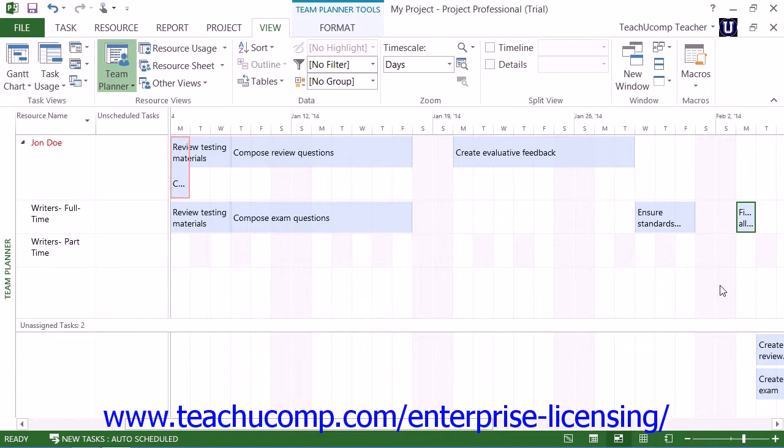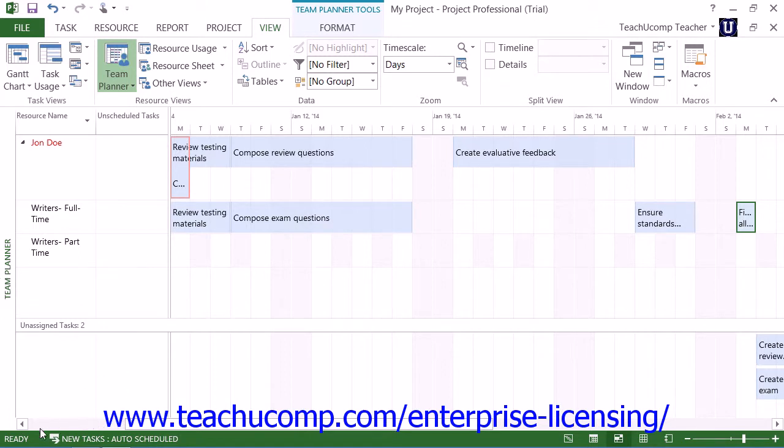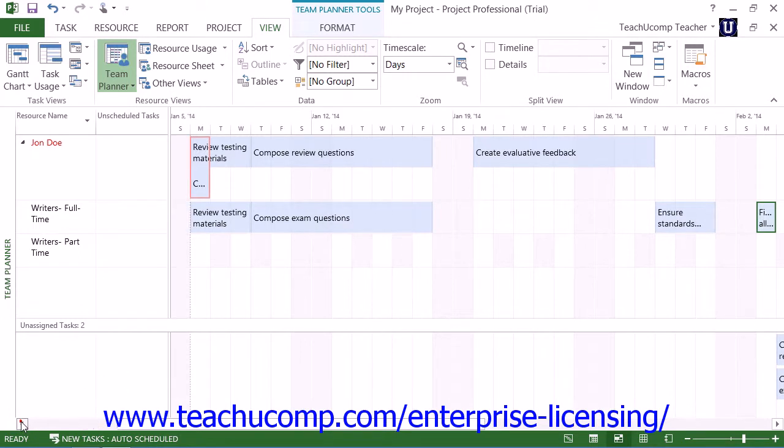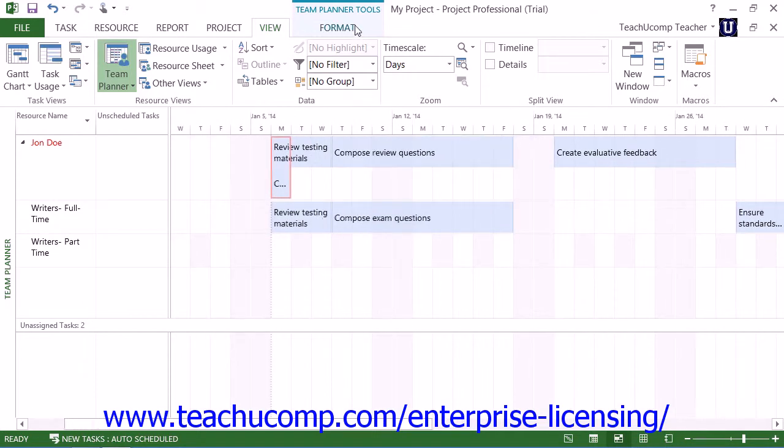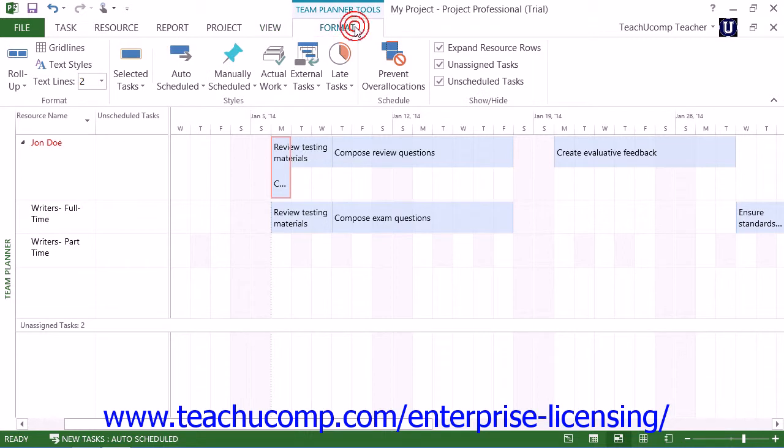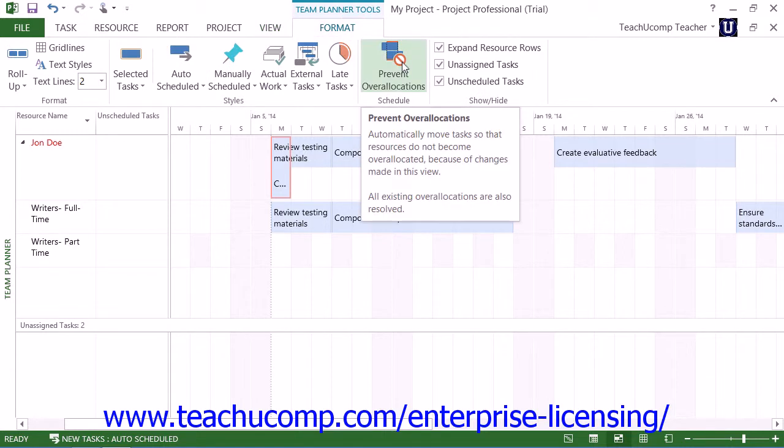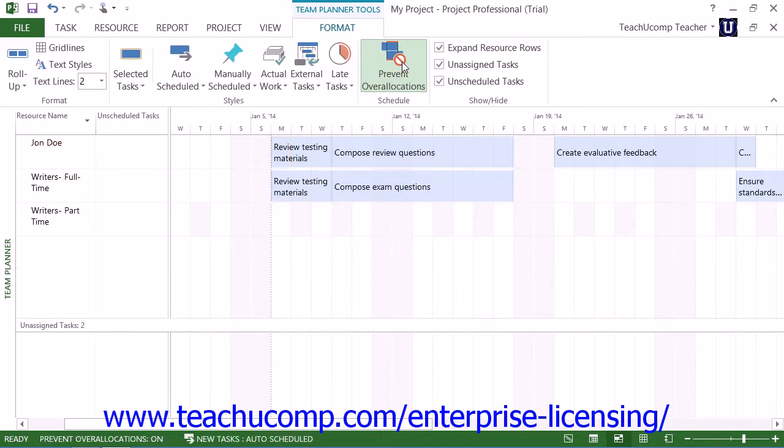Note that if you want Microsoft Project to automatically resolve over allocations within the project file in this view, you can click the Format tab within the Team Planner Tools contextual tab in the ribbon. Then click the Prevent Over Allocations button in the Schedule button group. This is a toggle button, so you can click it again to turn this feature off if desired.